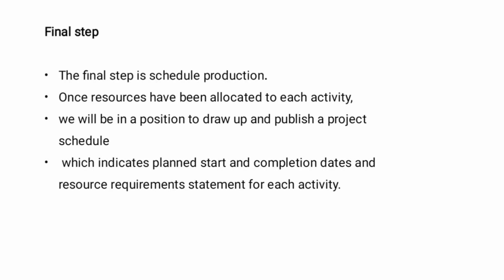The final step is schedule production. Once resources have been allocated to each activity, we will be in a position to draft and publish a project schedule, which indicates planned start and completion dates and resource requirement statements for each activity.